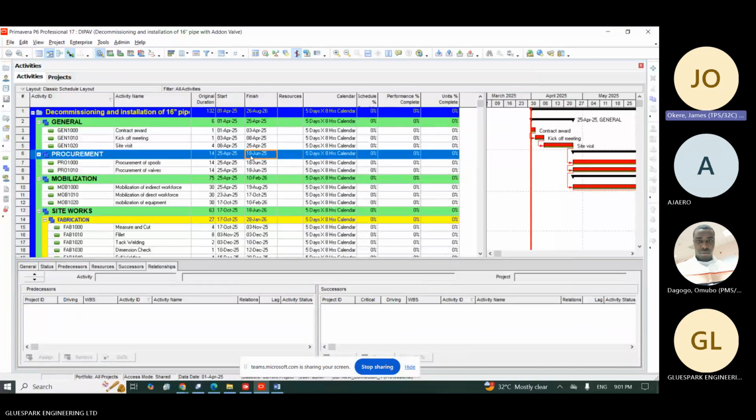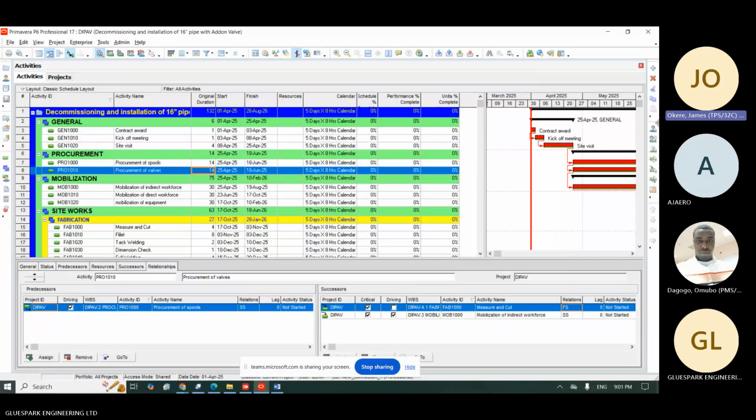Sometimes it can be, okay, make it start to start. If this one is finished to start, you can say make it start to start, right? Instead of reducing the duration, you can make it start to start, and you see the duration reduce, okay? So we call it schedule compression, but there are other logic that are involved. So we'll discuss it as a topic, okay? Well, basically, this is how to know when each of them is finishing.